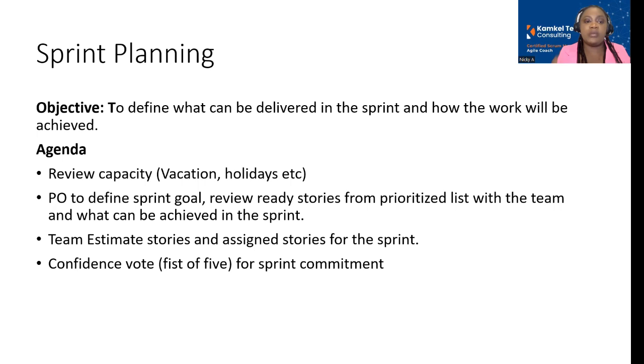However, if your team members have not yet updated their hours, their time off, just make sure you go around the room and call each team member and ask them if they have any planned vacation, any upcoming holiday, any time off. Just so that way you can only commit to what they can achieve. You don't want your team members to overcommit, accept too much work when they don't have the bandwidth. We want to make sure that they only accept what they can achieve in that sprint.